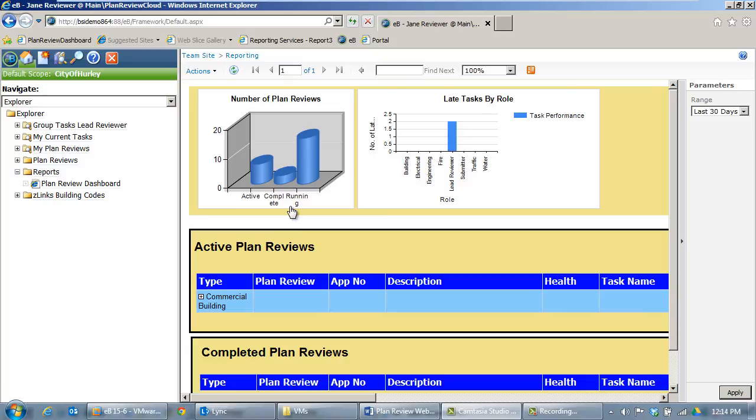You can see the number of active plan reviews, complete, and running. You can see roles or groups of users that have had late tasks indicating there may be a bottleneck somewhere in the process.